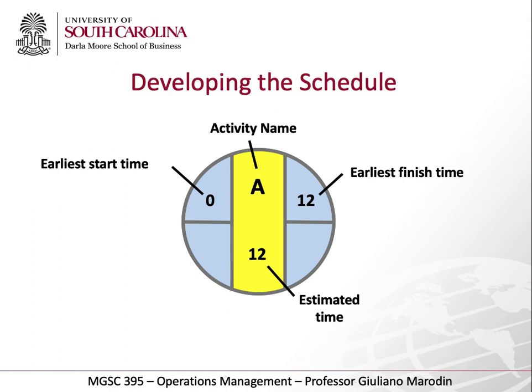And then we're going to see, step by step, how we work into the next step and the next step and the next step, okay? The bottom right part is going to be the latest finish time. I'm going to explain how to calculate that. But the math inside the bubble there is just to understand: the latest start time is just 14 minus 12 equals 2.